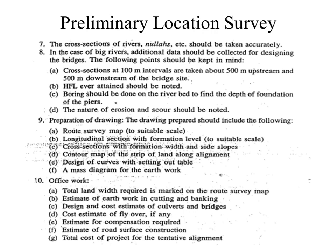The drawings prepared should include: a route survey map to suitable scale; the longitudinal section with formation level; cross sections with formation width and side slopes; a contour map of the strip of land along the alignment; the design of curves with setting-out tables; and a mass diagram for earthwork. Office work includes: marking the total land width required on the route survey map; estimating quantities of cutting and filling; design and cost estimate for culverts and bridges; cost estimates for compensation; estimate of road surface construction; and total cost of the project.